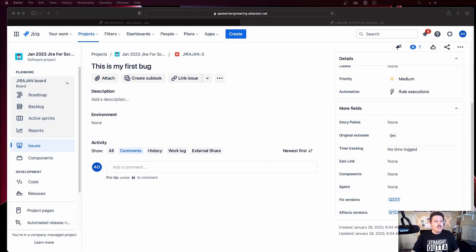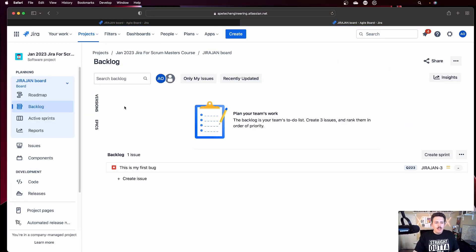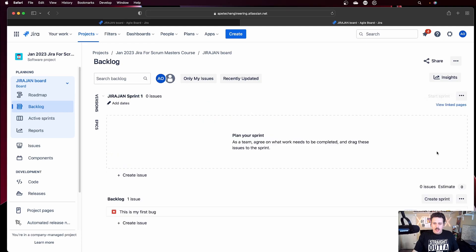When you go into Jira and you are in your backlog view, you have the ability to create a sprint. When you create your sprint, by default, it doesn't actually have any length. You get to define your very first sprint, and every subsequent sprint, Jira will ask you to determine how long you want that sprint to be. Not every sprint has to be the exact same length, and you get some creative freedom to dictate the length of your sprint.